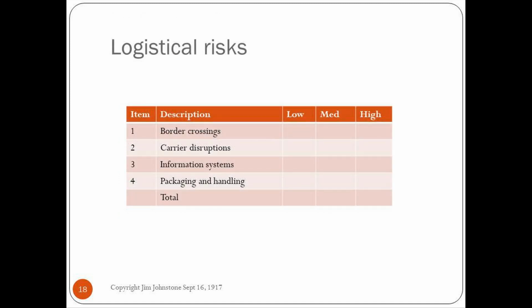Here's our logistical risk summary page, our matrix. While you're looking at that, I want to tell you a story about a part that I had when I was working for Applied Materials. Originated in China as a machined part, then was sent on to Japan for specialized ceramic coating. Then left Japan and came to California, where it was put into a subassembly. And finally, from the California supplier, it was forwarded on to me in Austin, Texas, where our factory assembled it into a final system. So we had 2 border crossings. We had 3 logistical legs to traverse. And we were dealing with 3 different cultures from around the world. The supply chain for this was terrible. It was the worst design I could possibly think of. And as a consequence, our supply wasn't very fluid on this part.